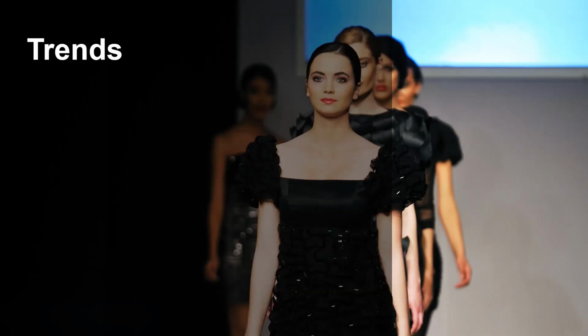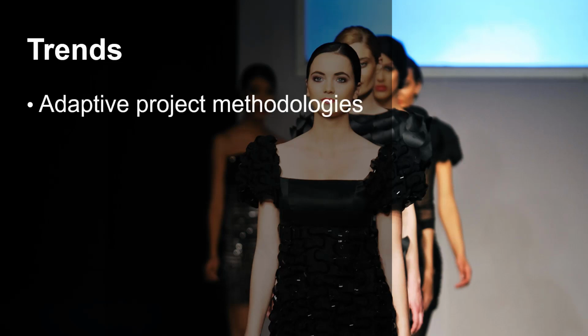The world is always changing, and even though you may think that methods around costing are static, maybe even boring, there are many aspects of the field that are changing, mostly based around core project methodology. Adaptive methodologies are changing how costs are determined. Some projects are simply given a bucket of money and told to produce what they can. Others determine the cost of each iteration based on the projected work and continue doing iterations until the product is developed or the team decides the project is non-viable, which usually happens very early on in the project.